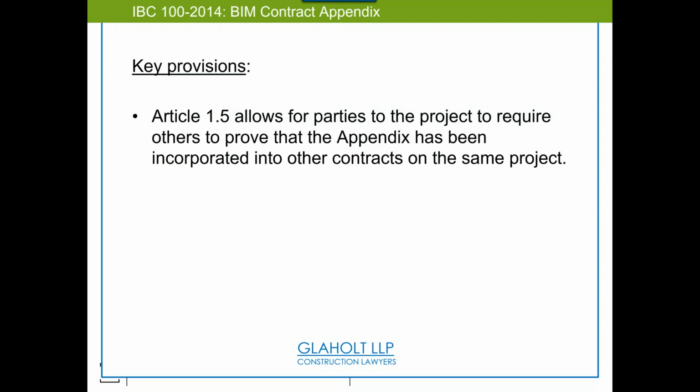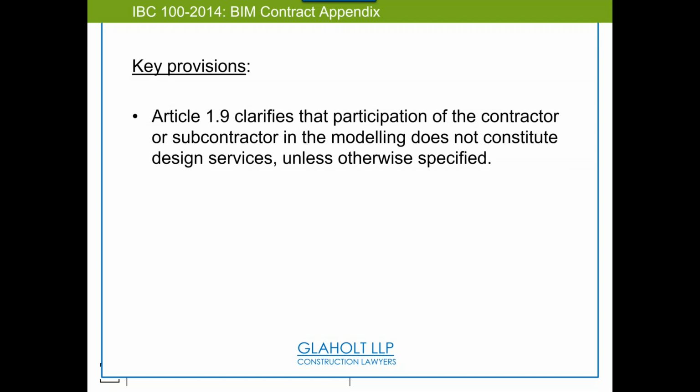This provision says all parties are required to prove the appendix has been incorporated into the contracts on the same project. So imagine the week 5 assignment or the week 8 assignment. You've got all these entities, right? You're all going to agree to work on a project. Now, when we get to the last slide, or remember the previous weeks I alluded to design build versus IPD. If we're in integrated project delivery, it's just a happy place. If it's any of the other contract modes, we all need to agree. So I'm not going to put the appendix on my contract and none of you put it on yours. We all agree that everybody on the contract has implemented the appendix.